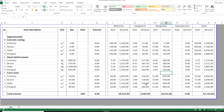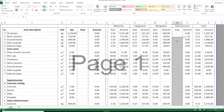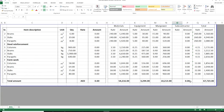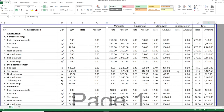Now I'm starting to get some numbers. I'm getting almost 55,000 for materials, about 3,300 for equipment, and 10,000 for the manpower — carpenters, steel fixers, and laborers required to do the casting. I assumed everything is done in-house so there is no subcontractor involved, which is why subcontractor is zero. I'm getting a total cost of 67,000 to execute the concrete works of this project.